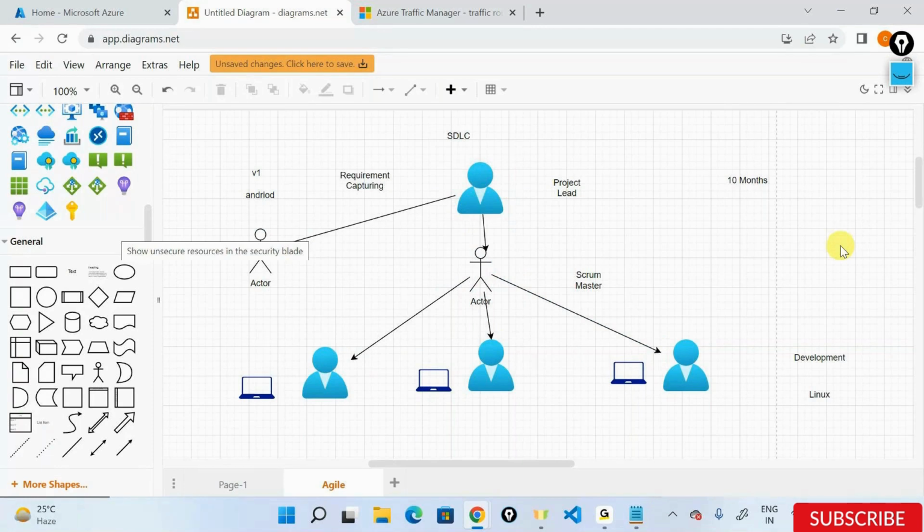Now, it's not 10 months right now, it's 2 months. And the promise here is that in 2 months, I won't give you the entire software. If I give you the entire software, it'll take some time. Tell me what are all the essential features of your software, the basic features. I'll deliver those basic and essential features first. Let's try it out. Let's see how it works out. Let's see if people are using it. And then we'll go ahead and develop the rest of the features.